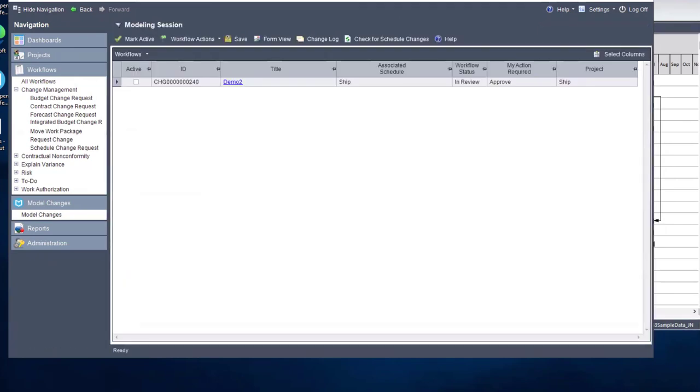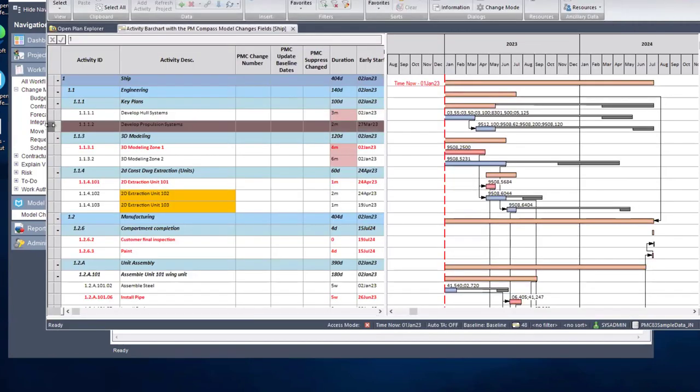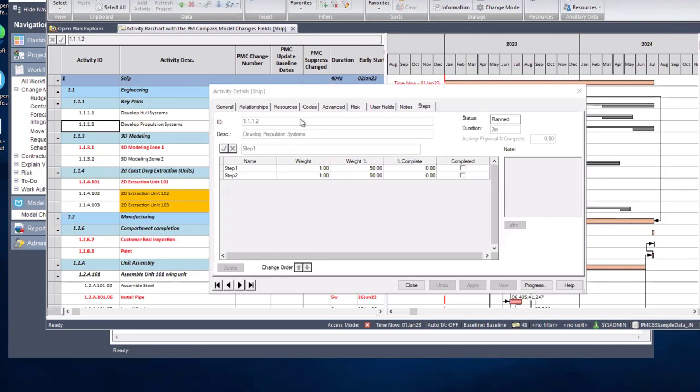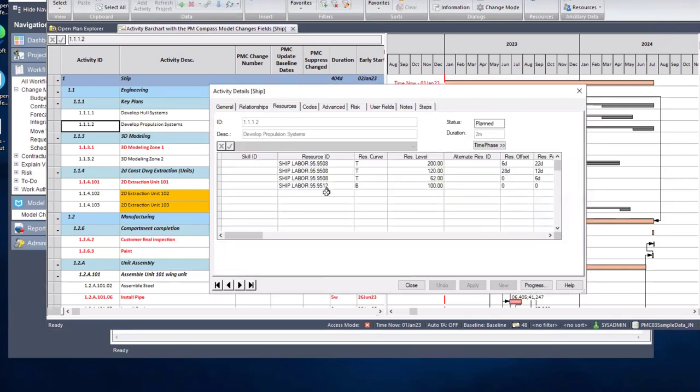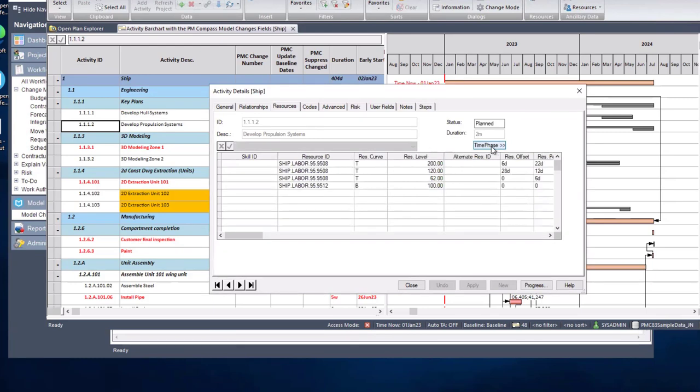And the benefit of that is if you start editing the time phase data for every single resource assignment, you're making your schedule larger, especially if your activities are really long, because you're adding multiple resource assignments. Oh, that was a perfect example. Go back to that one.